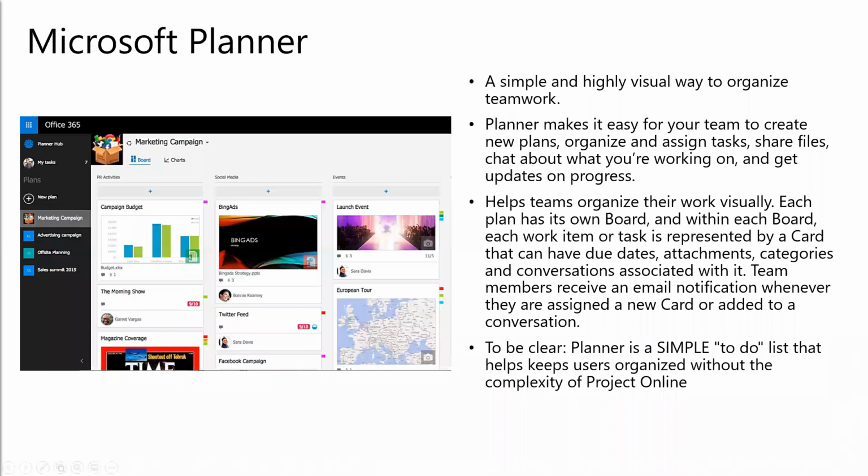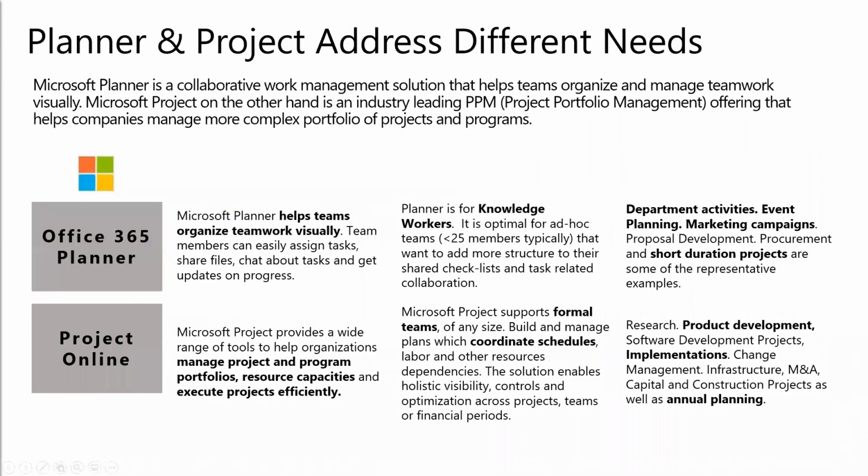So it's not going to work in that way, okay? And the reason for that is because they address different needs, okay? Planner is very visual. It's for knowledge workers, for ad hoc teams, typically less than 25 members. Honestly, I'd say even less than that, 5 to 10 would be optimal, I would think, for Planner.